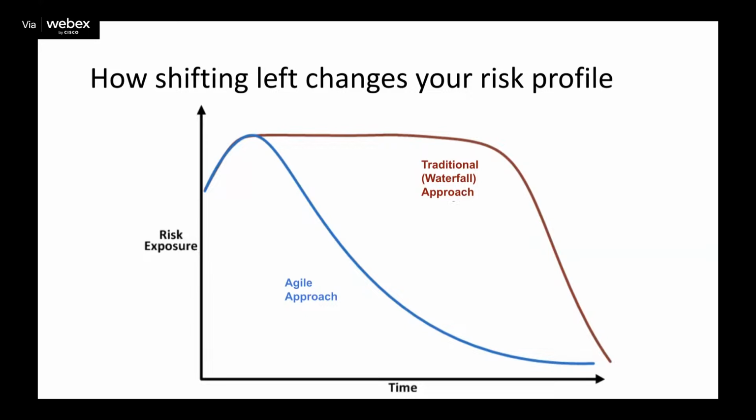In our traditional or waterfall approach, we're just ready to go live with a beautiful product that we've delivered. And now the legal and compliance and risk people come in, and the marketing people, and the enterprise architects, and they tell us why we can't go live. But when we use this approach, we end up focusing on reducing risk. And every sprint, in our sprint review, we might actually have a little section where we talk about whether we reduced risks or not. And so we can focus on risk.